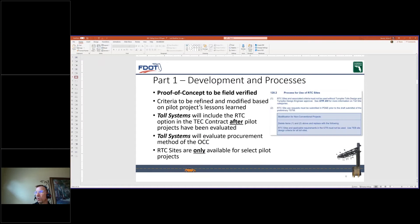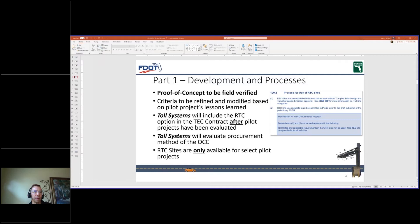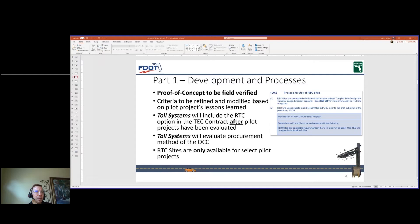At this time, the RTC design has not been installed in the field to validate the design, operations, and maintenance aspects. We are currently implementing a ramp pilot project to vet the on-site and off-site power designs currently shown in the 2021 GTR exhibits. From this pilot project, we plan to modify the current design criteria based on lessons learned identified in the field by the contractor and CEI. Through parallel efforts, Toll Systems will modify their existing TEC contracts to include each vendor's RTC solution to support their Toll System.